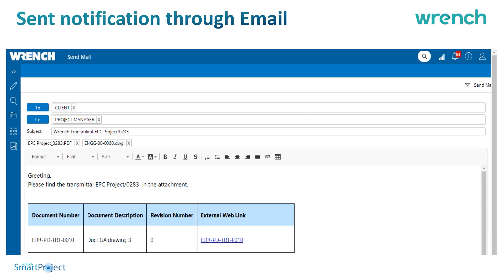Transmittals can be sent as an email with the cover sheet not as an attachment but as a link, so the client or contractor can download it using the external link. This prevents cluttering of the drawing repository by avoiding sending drawings as email attachments.